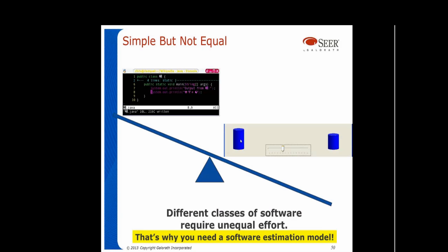That's why we obviously produce a software estimation model for a reason. Once you enter your functional size, you may establish that these are two items of equivalent size, but it's all the other parameters in CRSM that say that this is much more work to do. That's why functional sizing complexities need to then be input into some sort of estimation method. The complexities alone don't tell you how much time a function takes to do.